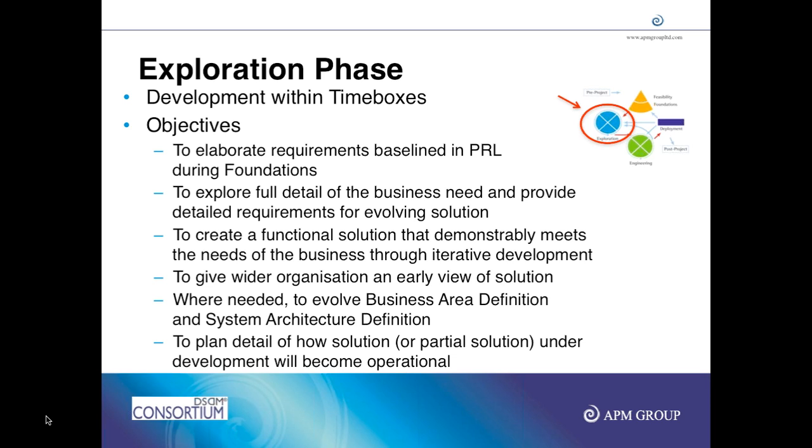We move into the foundations phase, which is where we lay the foundations for the business, that is the business case that justifies why this project is being done. The solution foundations tell what solution will be delivered, and the management foundation says how the solution will be delivered, that is the time, resources, costs, and efforts. Now the reporting will be done. Once foundations are completed, we move to exploration.